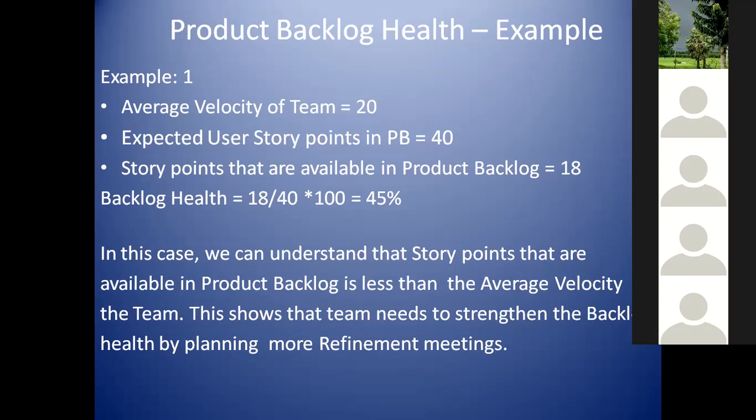When you see that the story points available in the product backlog are very few, and your backlog health is just 45%, then it's time to have more refinement sessions so that it will increase your product backlog health. Okay, this is example number 1.